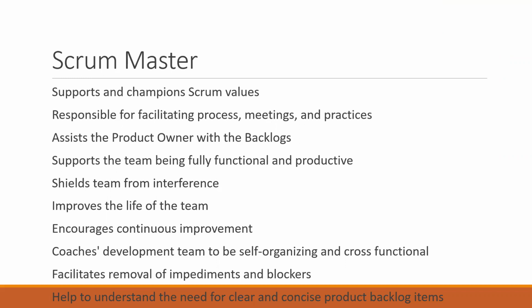All right, Ruth, you used an example for the daily stand-up, right? Yeah, that's a little bit tricky, because guess what? This question they always ask, do you need a Scrum Master to be in a daily stand-up? So you want to be careful with that example, because remember, the daily stand-up is for your team members. You don't necessarily have to be there. One of your roles is just to time box it. So if your team is self-managed in a way that they are at that level, you don't have to be there, and they're going to do what they're supposed to do, right?